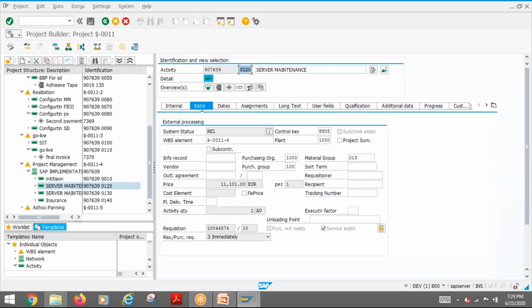Then you have to pay something once the design is approved. Once it is ready for shipping, you need to pay something. Once it has arrived, you need to pay something. Then after that, some percentage you need to pay after some time. If you have worked with big construction industries, you will find this kind of complication comes. Anyway, don't get confused. I'm just giving you a bit of these scenarios and how they can be used. Okay, I think that is all.